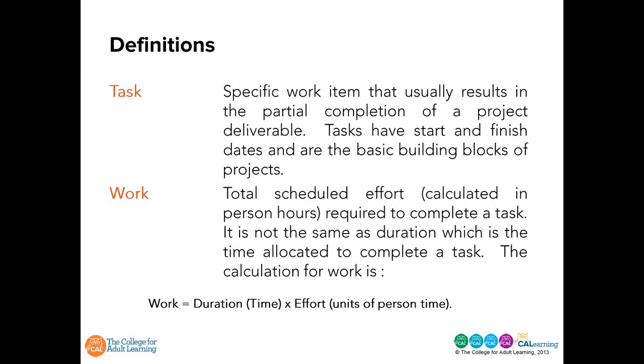Tasks have, just like activities, finish and start dates, and other basic building blocks of projects. Work, the total scheduled effort, generally calculated in person hours, required to complete a task. It's not the same as duration, which is the time allocated to complete a task. The calculation of work is work equals duration, time, multiplied by effort, units of person time.